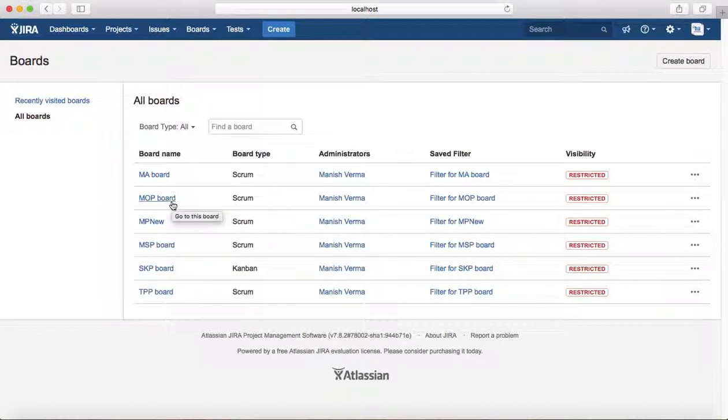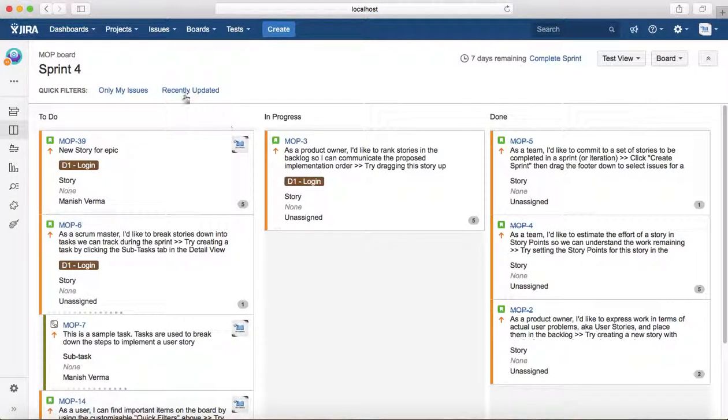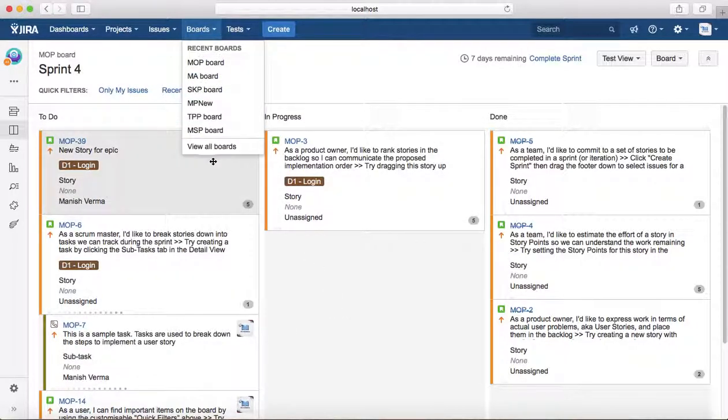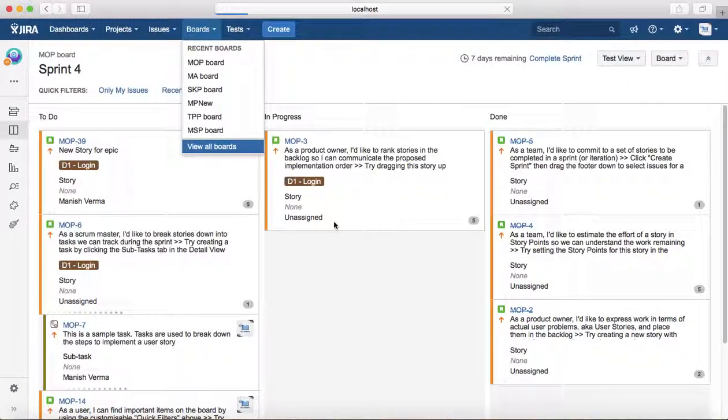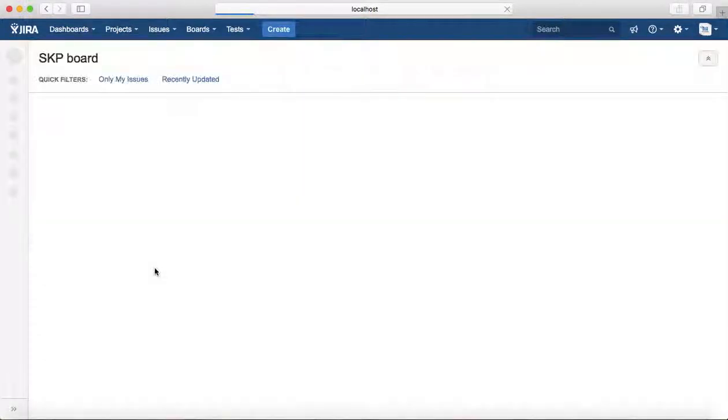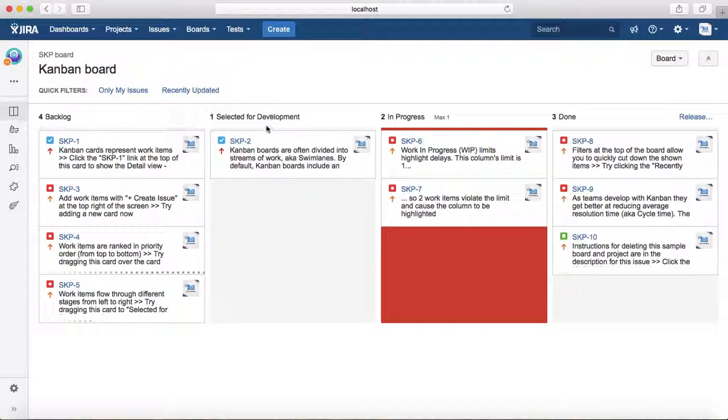For example, I want to look at details of the MOP project board, so you can click on MOP project board and it will open the board for the MOP project. You can see the sample Kanban board as well, the SKP board. That's the Kanban board which has a backlog, then selected for development, in progress, and done.